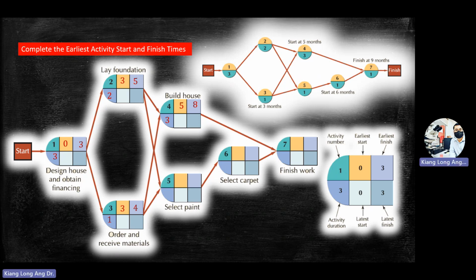And just a time of rules, we always choose the biggest number. If we have 2 pathway, we will choose the biggest number for this. So every time if you do forward pass, we do forward pass means from here to here, and you see number for this orange color one, choose the biggest one. Because sometimes, like for this case, you see 5 and 4 come into that 6 box. So you choose the biggest one.